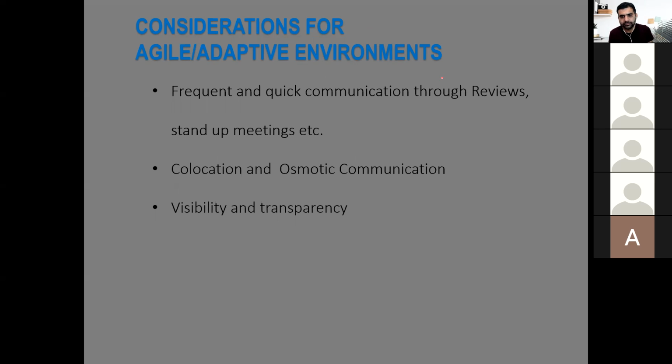Frequent and quick communication through reviews, stand-up meeting. Yeah. So communication is much more often and quick in agile environment. We have communications daily with the help of daily stand-ups, and at the end of each iteration that could be product reviews, that could be retrospectives. Next.